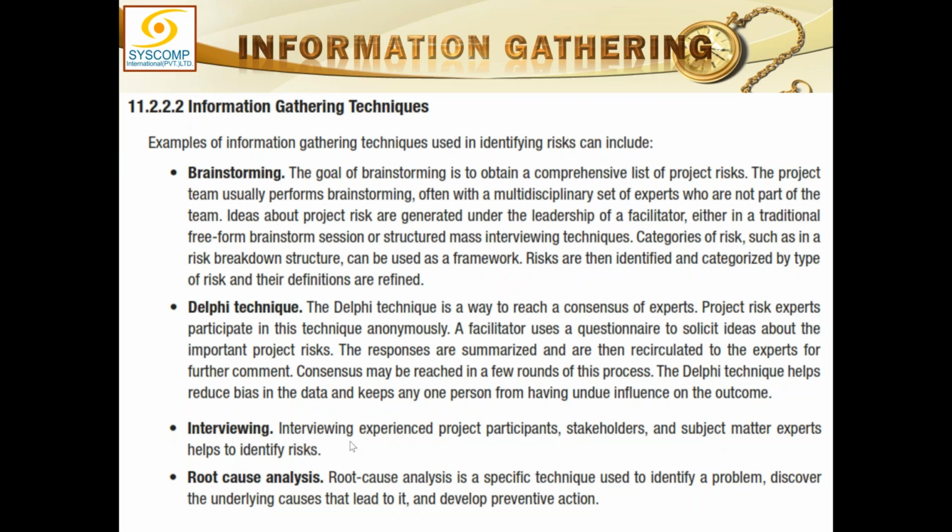Then there are the interviews. Interviews are only conducted when qualitative data is required, and when the people who hold the data are few and they can be interviewed. So this is much better if we can somehow interview everybody, because if few people are there, we can go to each one of them, get an appointment with them, and we can interview and collect as much data as we can. This will be quality data we will get.